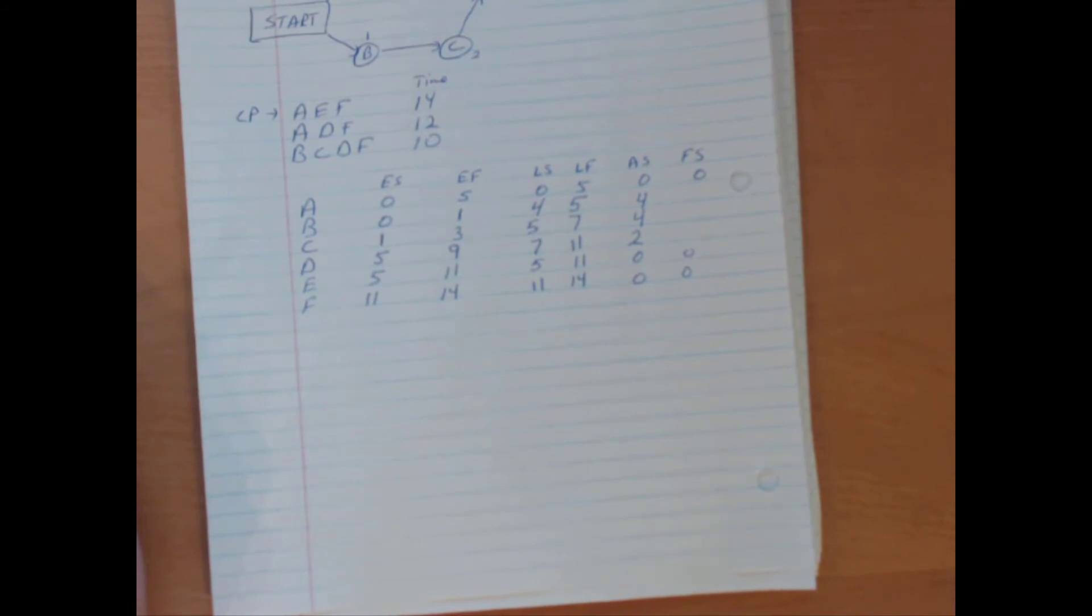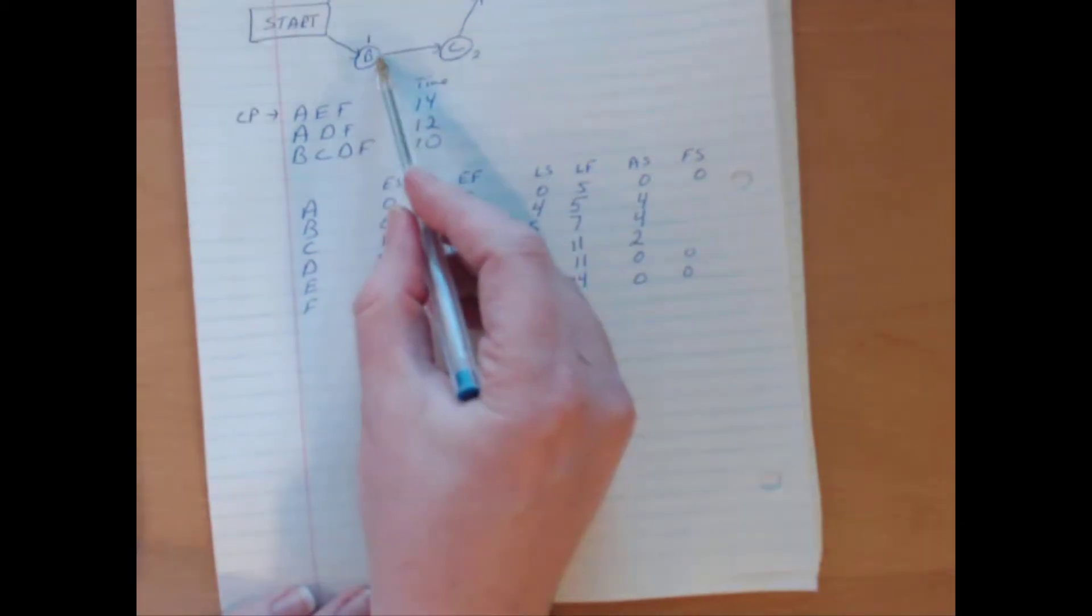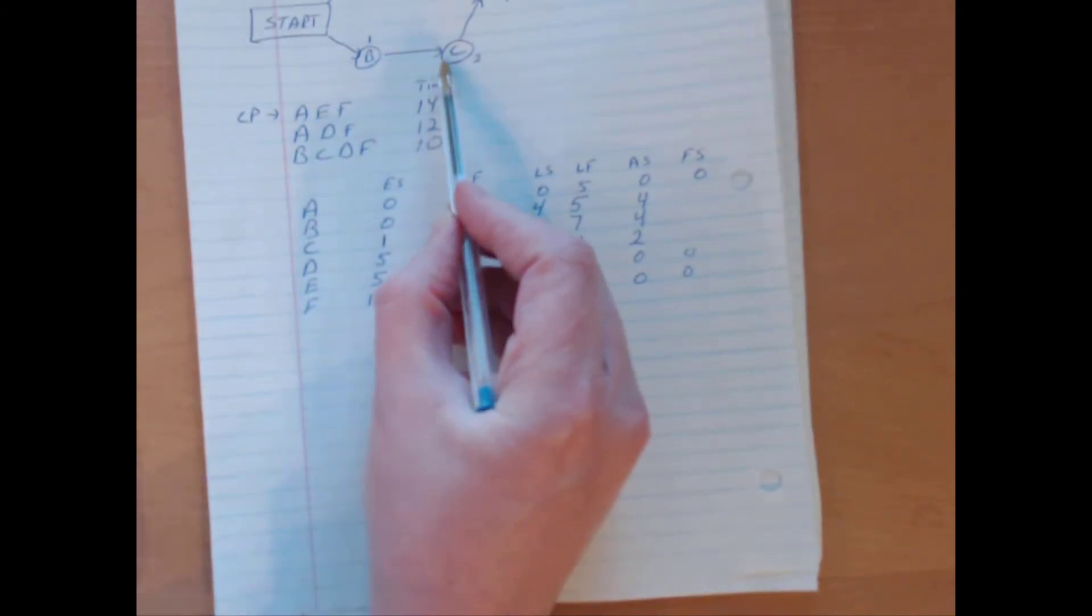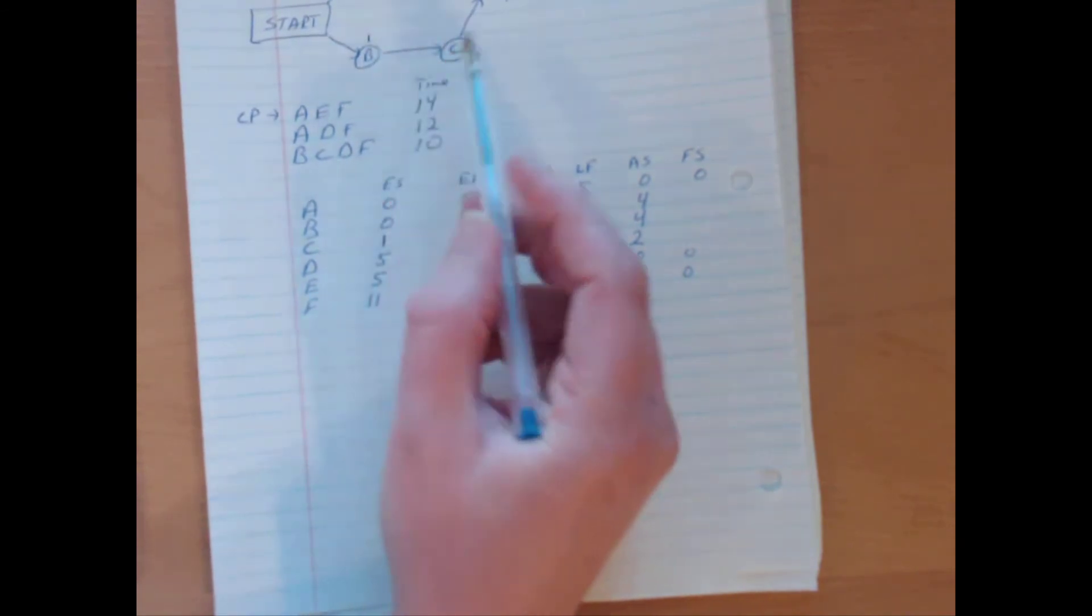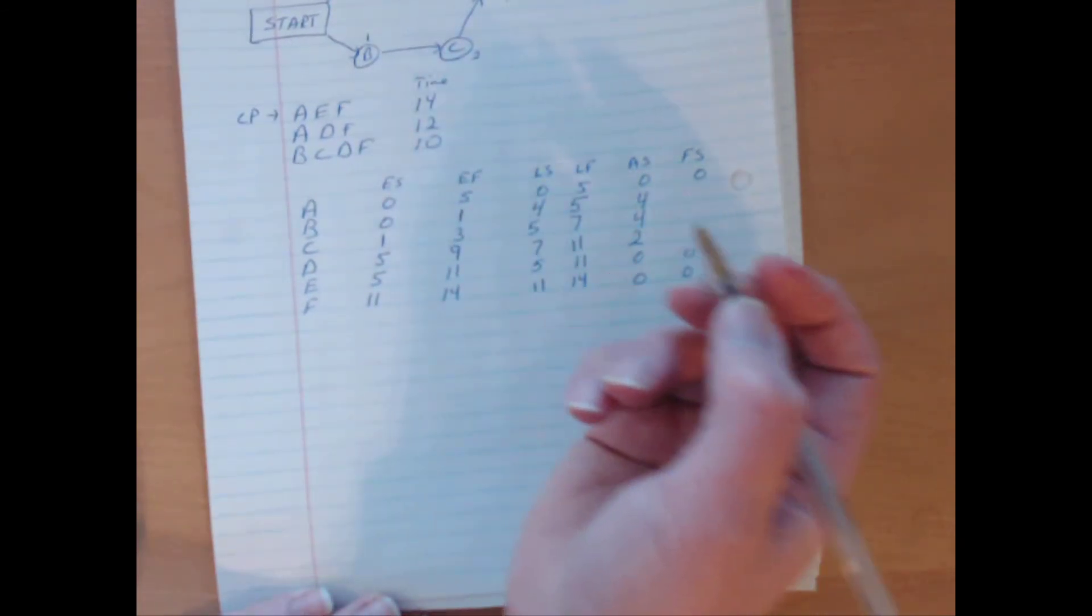Free slack, however, is a little bit more restrictive. Just because there's activity slack does not mean there has to be free slack. All that free slack means is that any delay in a given activity will delay the activity that follows it. So, for instance, let's look at activity B. Any delay in B, while the activity that follows B is C, any delays in B will result in a delay in C. So no free slack there. Even though there's activity slack, there is no free slack.